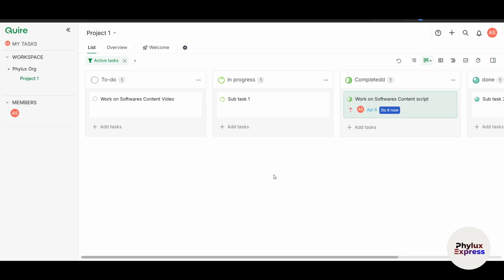For example, if certain tasks are consistently delayed, consider reallocating resources. You can assign more people, extend the deadlines, give a special priority, right? Whatever it is, you can delegate to different subtasks so that the task can be completed as soon as possible. So this is how it is done.